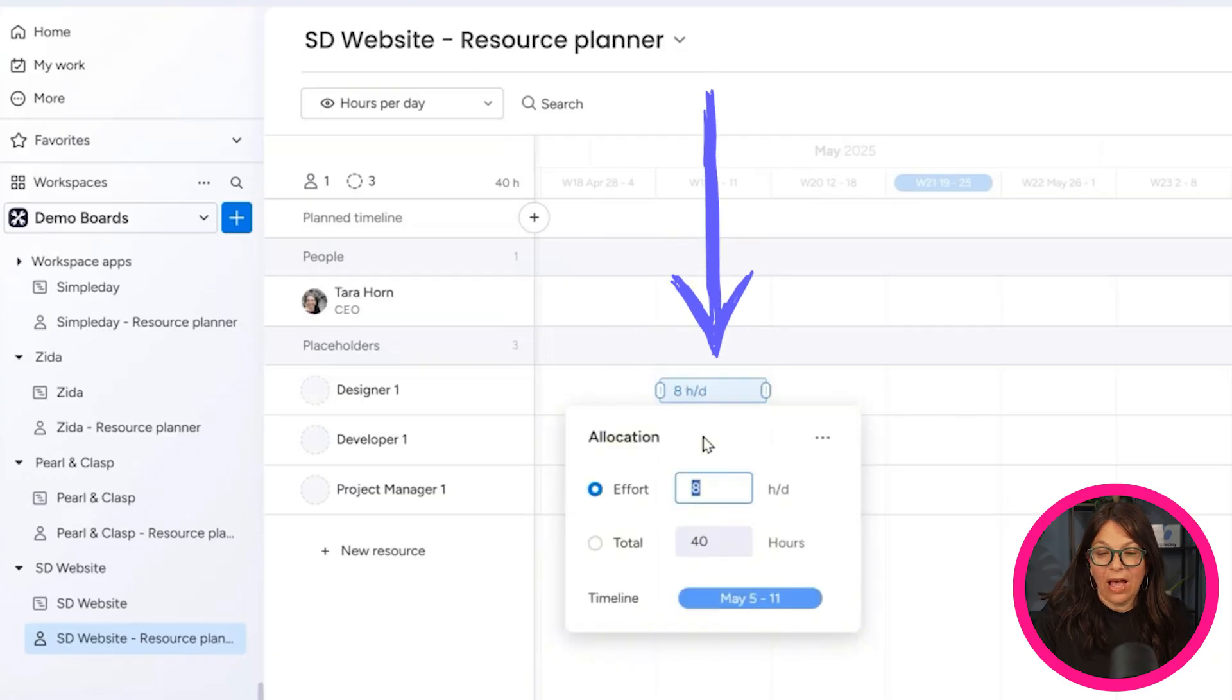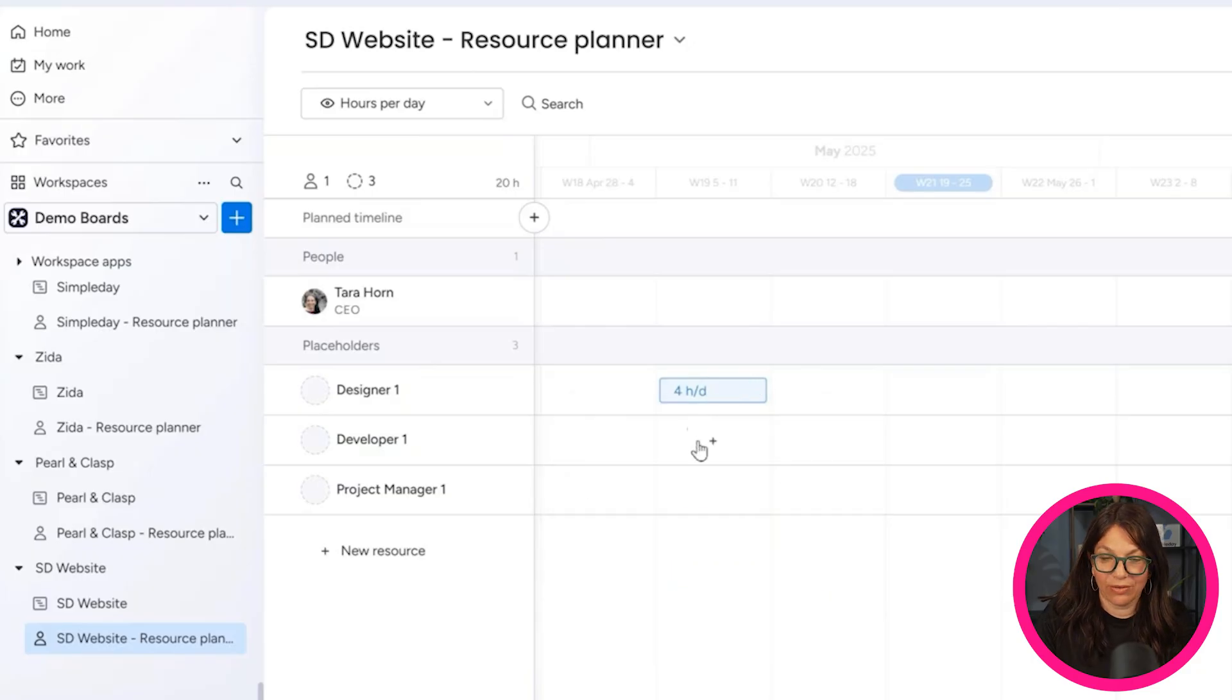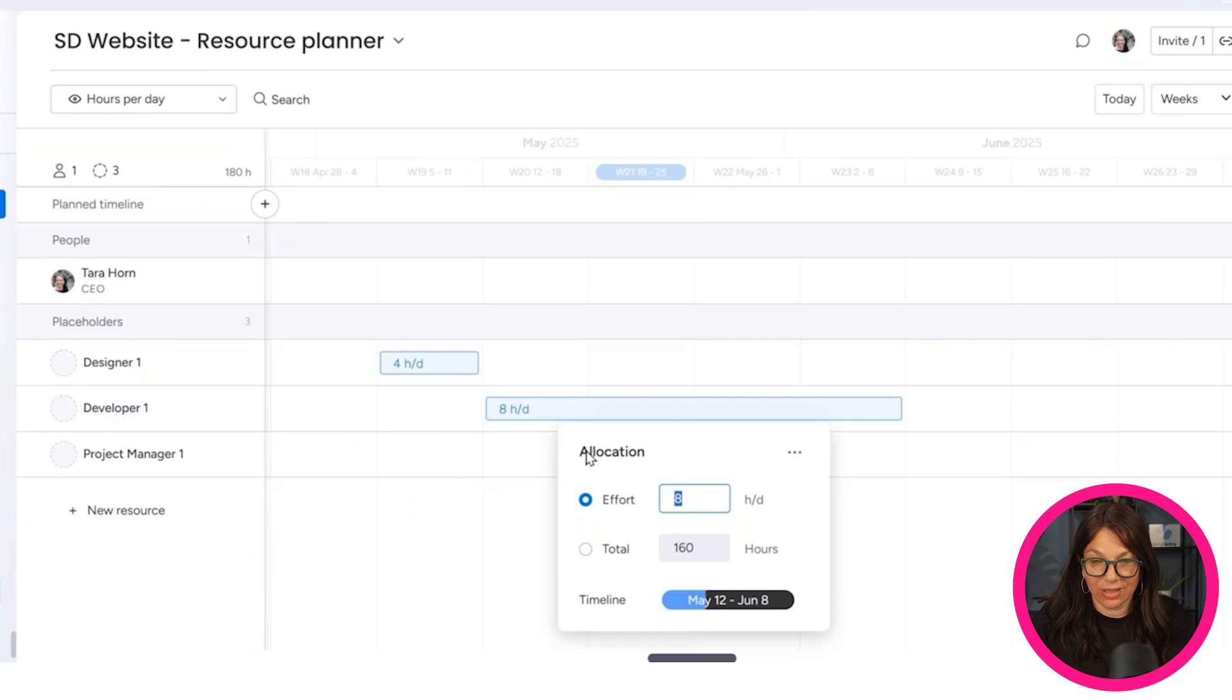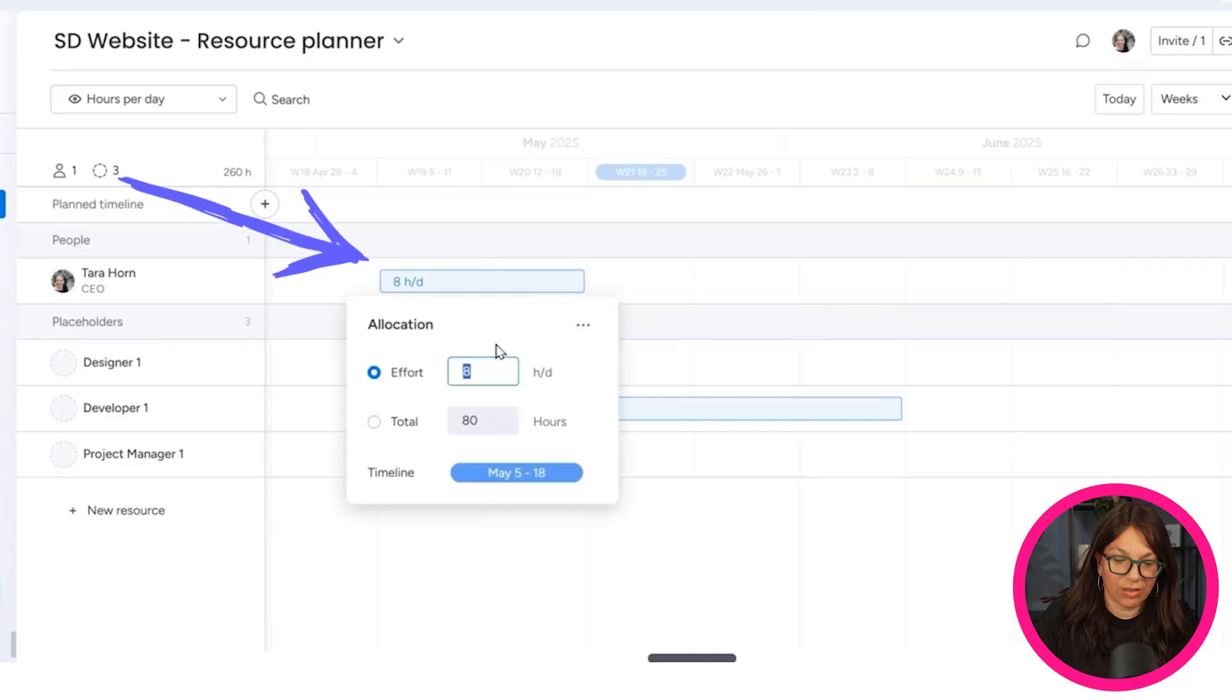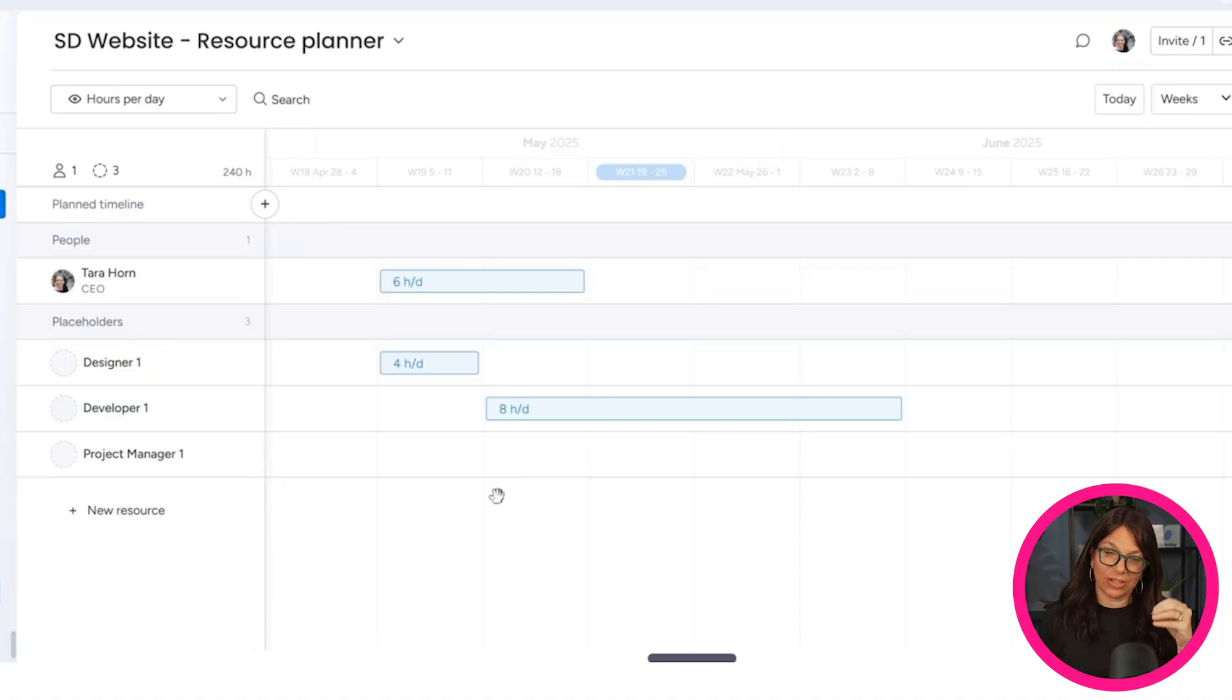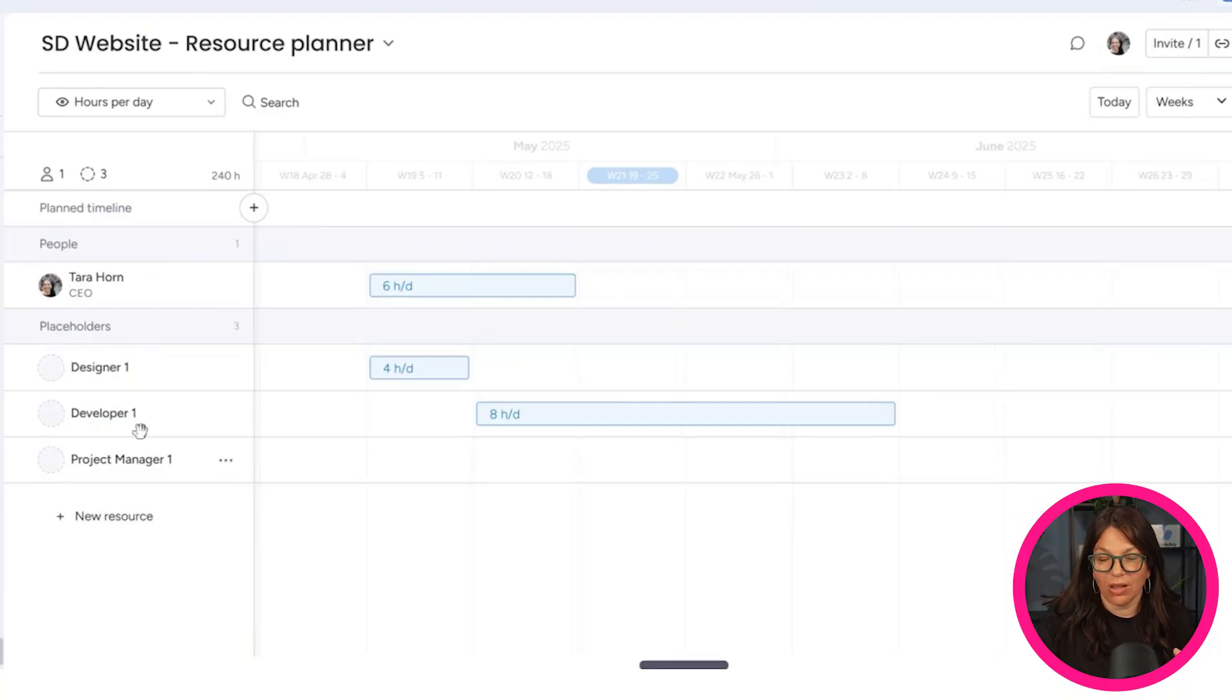I can specifically add a person. I'm going to add my person, but I can also add a placeholder. So let's say I need a project manager for this and I need another placeholder is I need a developer. And another placeholder is I need a designer. Then I can say, I need four hours a day, or I can give a total over my timeline. And here you could see I have four hours a day. Let's say for the developer, I want them here eight hours a day for these few weeks of my project. For me, I'm going to do it six hours a day over those two weeks. So here you can see per project. I have either the planned or the actual person. Which is just really cool.